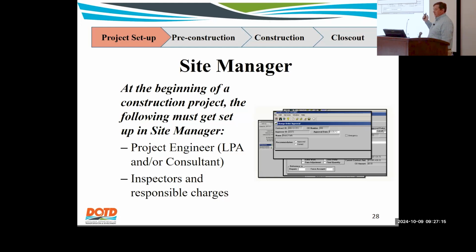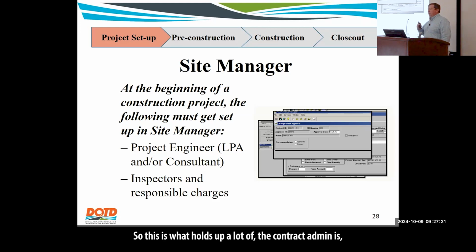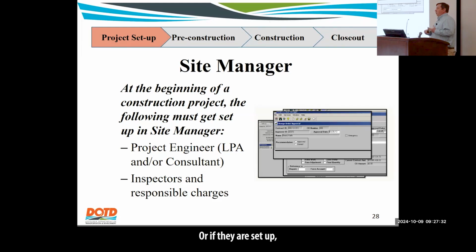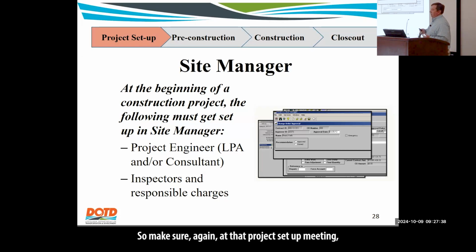At the beginning of the project, you must be set up in Site Manager. This is what holds up a lot of the contract admin: the CE&I consultant or project engineer wasn't set up yet, the inspector wasn't set up yet, or if they are set up, they didn't get contract authority. So make sure, again, at that project setup meeting, you are all set up in the system, you're good to go, your inspectors are signed on, all of that, so that when the project's up and running and you go in to try to do a daily work report, and it's not there,